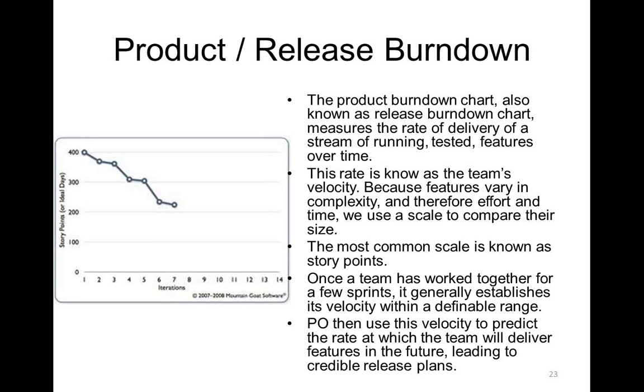If they finish their sprint faster, they are free to take up more stories in consultation with the product owner, again on the same priority basis. That's how the whole project progresses, the visibility remains there, and the schedule is known. The predictability is there, whether the project is going to be completed in the given time or not.